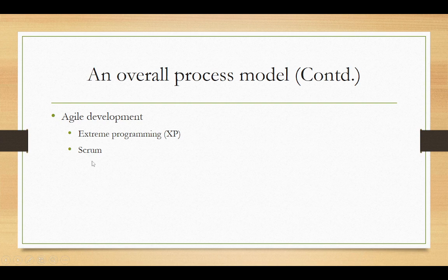Another popular agile development approach is Scrum. Scrum also defines a set of roles, events, artifacts, and rules. All events are time boxed and have well-defined rules. They comprise the sprint, a development phase no longer than a month that has as a deliverable a usable working increment. It includes the sprint planning meeting that lasts no more than 8 hours. It includes the daily Scrum, a daily meeting no longer than 15 minutes, looking at what has been done and planning the work for the next 24 hours. So many of the agile practices are geared to better communication and collaboration among developers.